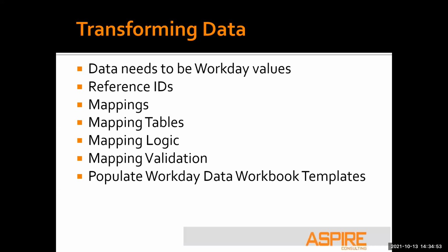My name's Janet. I was curious, what if you have a medium or small size company? Is there a downside to converting? Like if you have 7,000 employee files, but only 3,500 of those are active or recently termed or retired, is it a downside just to converting all of the records? Because you mentioned that you may not want to convert everyone, but if you don't have that many, is it a downside to that? So in most cases, your Workday license will be based on the number of employees you have. That's usually what drives that decision.